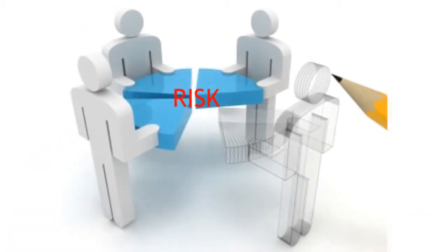From my experience, some examples of additional risk transfer to the contractor are: number one, making the contractor responsible for price increases over a multi-year contract. Number two, requiring a fast-track schedule which has little room for unexpected situations, or imposing a very high daily penalty for late completion. Or number three, requiring the contractor to use owner-supplied materials, but keeping the contractor responsible for their quality.